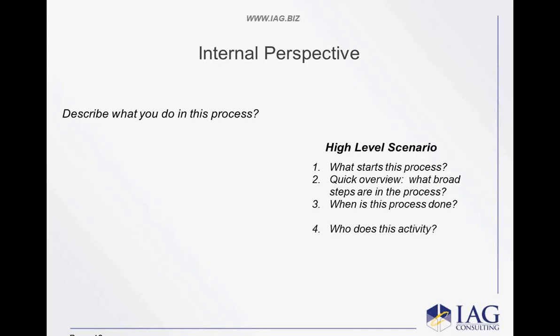So from an internal perspective, let's kind of pummel through this. And Dominic, I'm going to give you that. How long is the time frame to uncover the internal perspective, and how many players are involved? Dominic, on a $17 million project, we've done that in 2 weeks, okay? And we had 40-odd people in the room. So you can cruise through that extremely quickly, and let me give you a sense of how you do it.